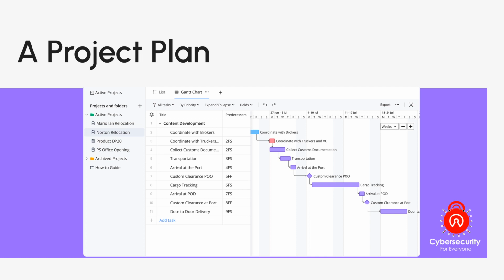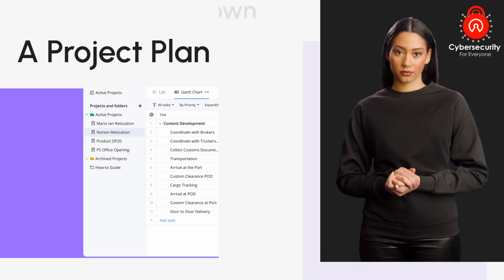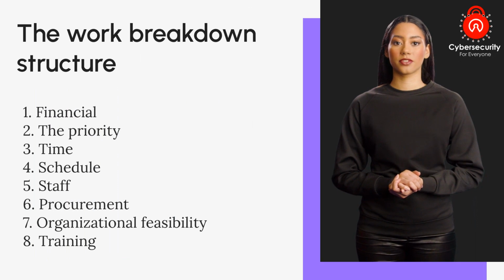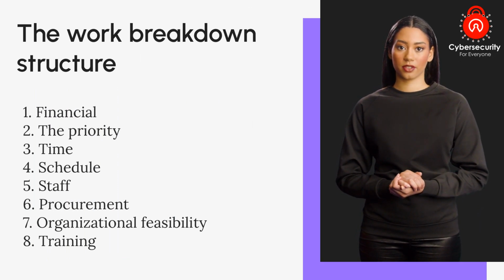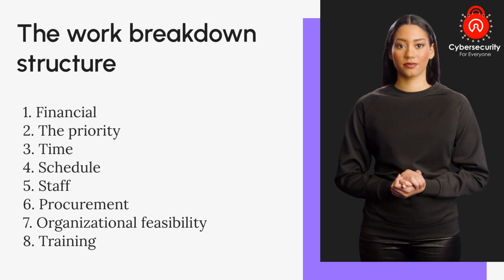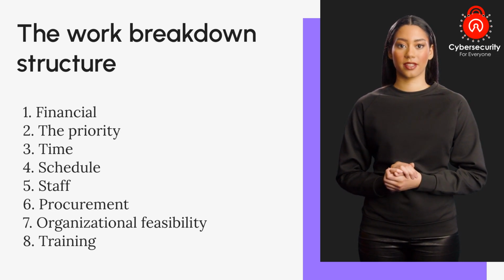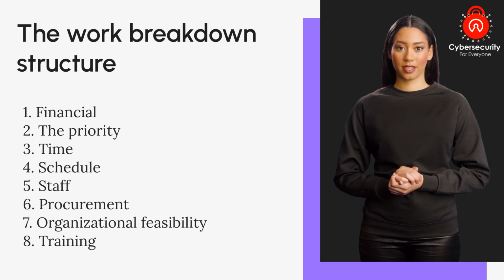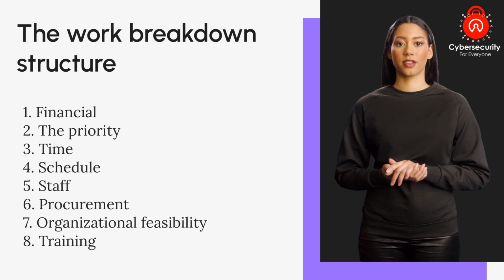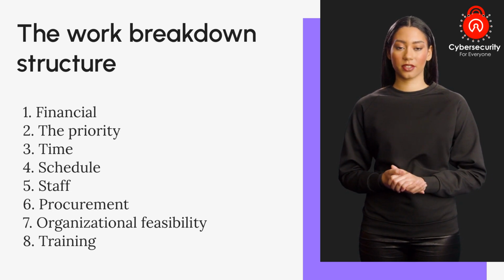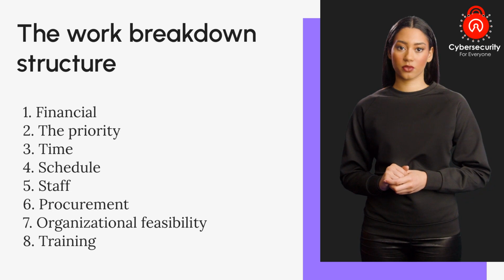For project planning, there are priority considerations. The most important is that information security controls should be included. Implementation of controls is guided by the prioritization of threats and value of threatened information assets. For project planning schedule and considerations, time impacts dozens of points in the development of a project plan, including the time to order, receive, install, and configure the security control, time to train the users, and time to realize the return on investment.